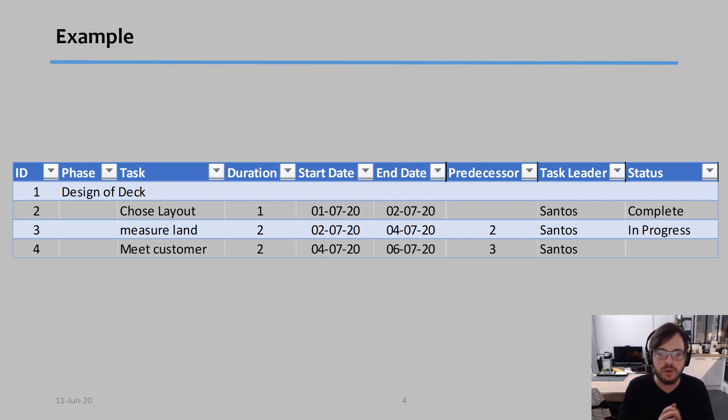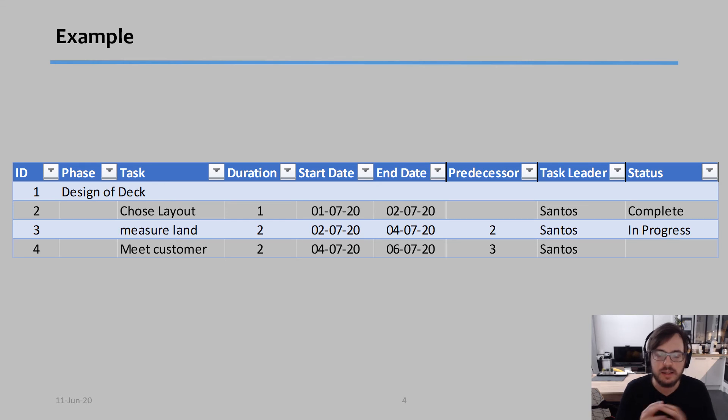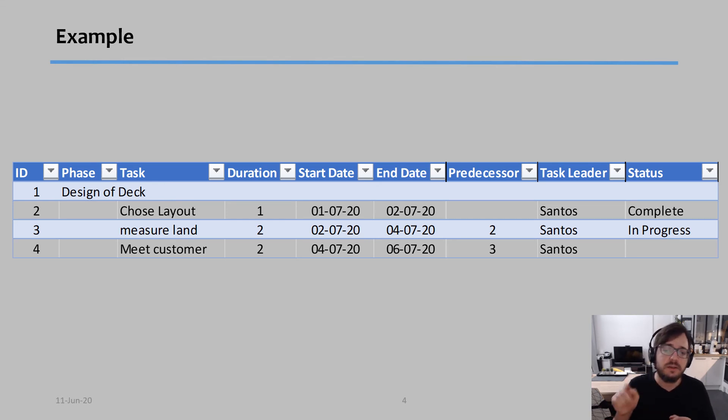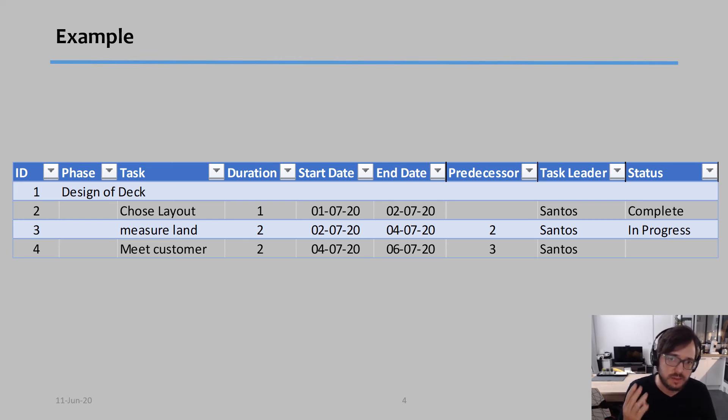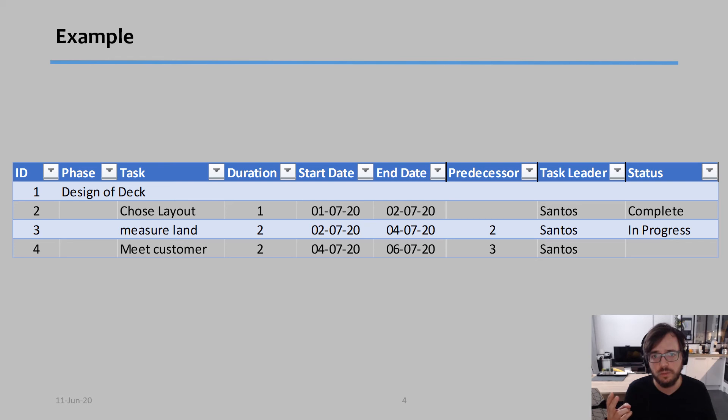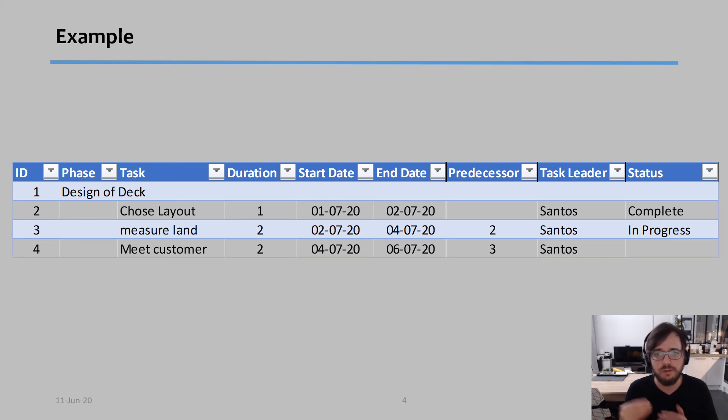So the start and end dates really help. So if you notice, duration, start date and end date is about schedule. Predecessor, this is what task must I complete before I can start this task. So for example, I can only do task three if first I finish task two, I can only do task four if first I finish task three.